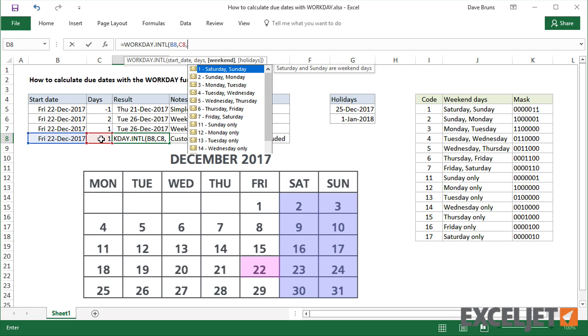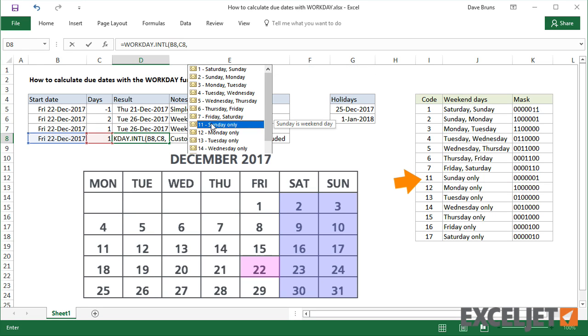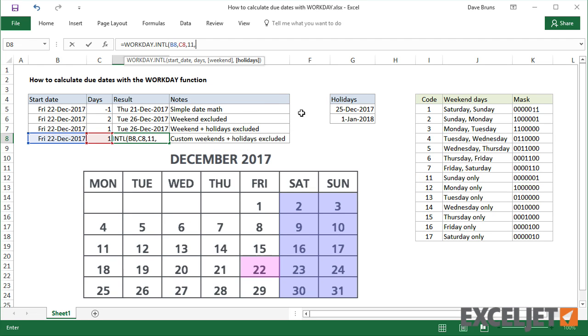For example, if Saturdays are normally Workdays, you would supply the code 11 for Weekend. And WorkdayINTL will treat Saturdays as Workdays.